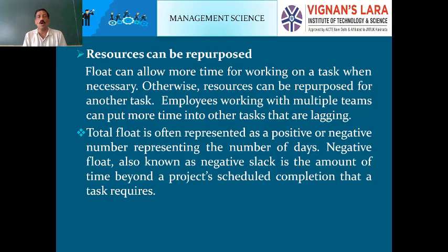Further, total float is often represented as a positive or negative number, representing the number of days. Negative float, also known as negative slack, is the amount of time delay on project schedule completion that a task required.